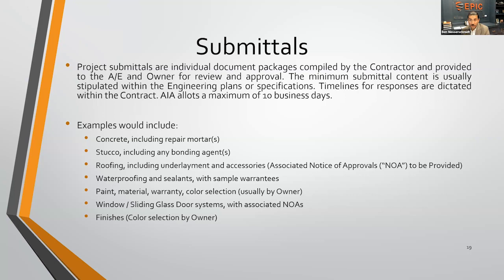So if you're using all Sika products, for example, you may have a Sika representative or a BASF or Tremco or Sherwin-Williams or Benjamin Moore or any of the other slew of international companies do their inspections, and also write associated letters ensuring that the work is being done to still achieve a material warranty at the end of the day. Some of your best warranties within a building system are going to boil down to your roofing warranty. Those typically have a 20-year roofing warranty as standard.